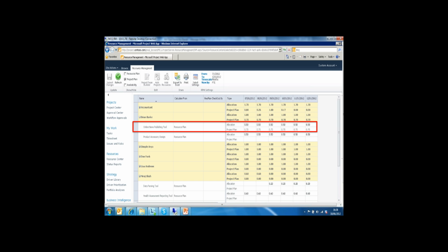So I, as the team manager, can say, okay, I understand that you need more resources here. I'm going to assign someone else. Who else has time? I see Niraj again. Niraj has some more time. He's allocated only 80% of his time. Maybe I can take some of the work and transfer it to Niraj.